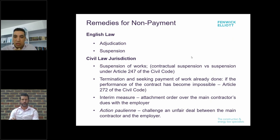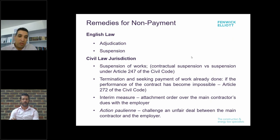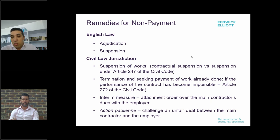Some contracts provide for suspension rights, others do not. In case there is no suspension provision in the contract, a party seeking suspension might rely on the legal provision in the civil code and must comply with any notification provisions. If there is no notification provision, they must — out of good faith in performing the contract — notify the other party of their intention to suspend the work within a reasonable time frame.